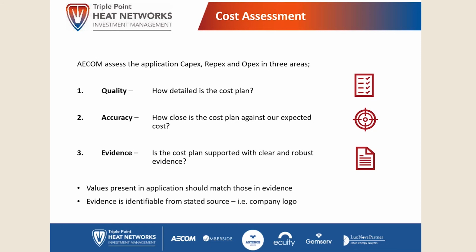We'll then have to compare that with your budget and make sure that we haven't got any project specific things that are a bit difficult for a standard model to cost. So if you have a ground source heat pump with a closed ground loop, that's not something that will appear in our model. But if we know that that is in there because that's been put in your supporting evidence and you've put some note about it in with your costs, then we can adjust our model to take account of those sorts of things.